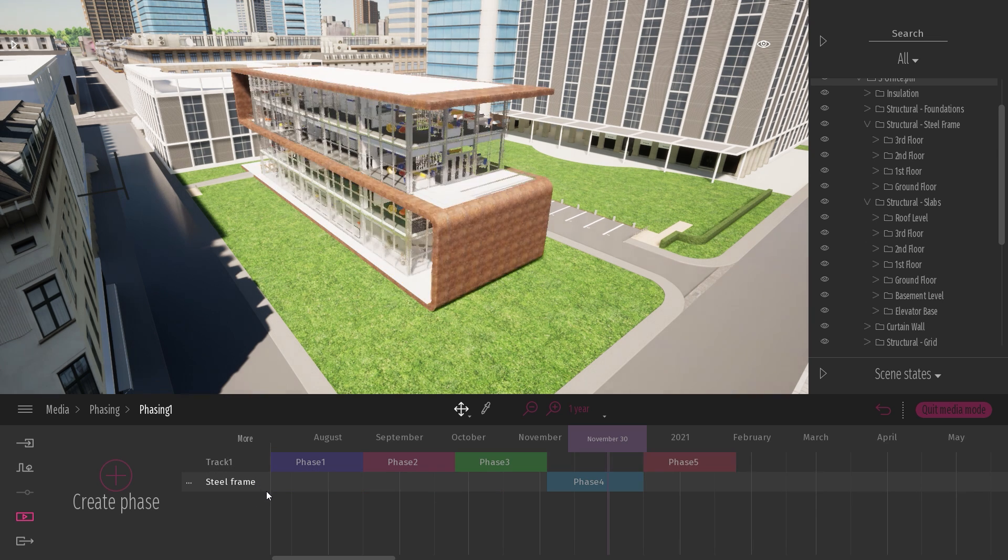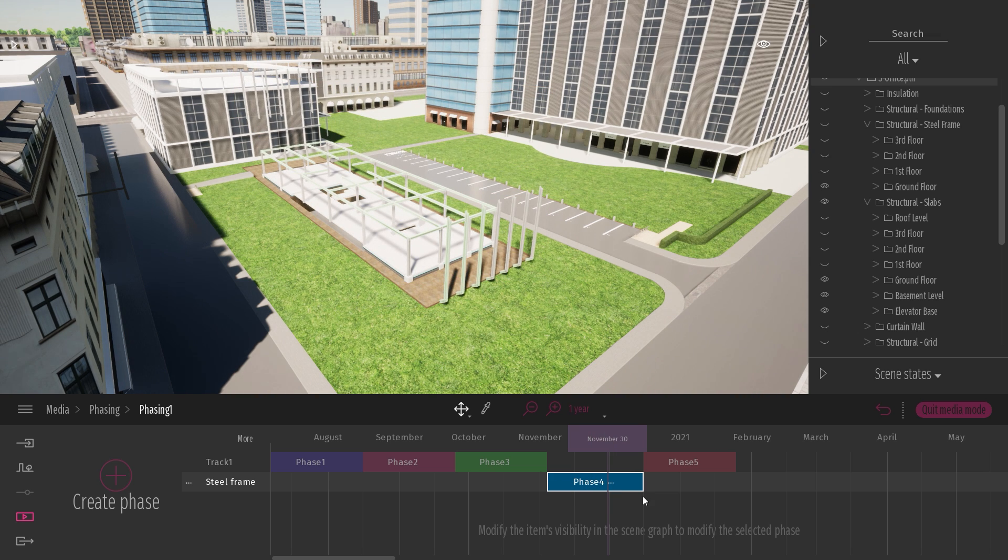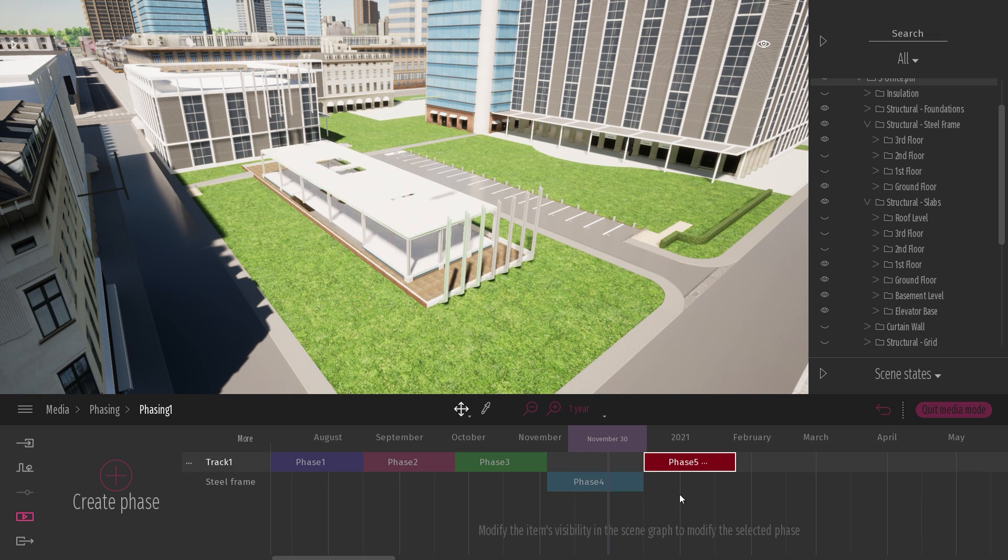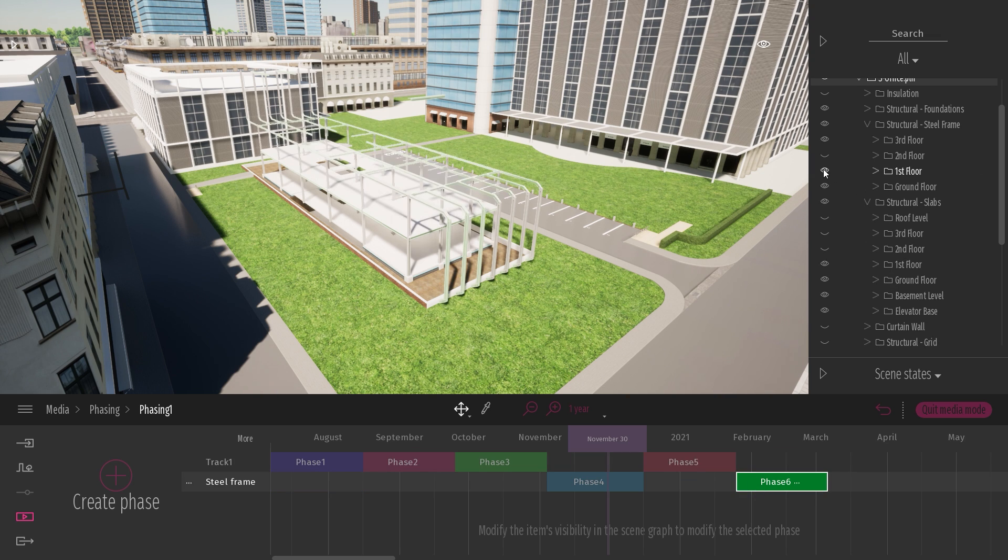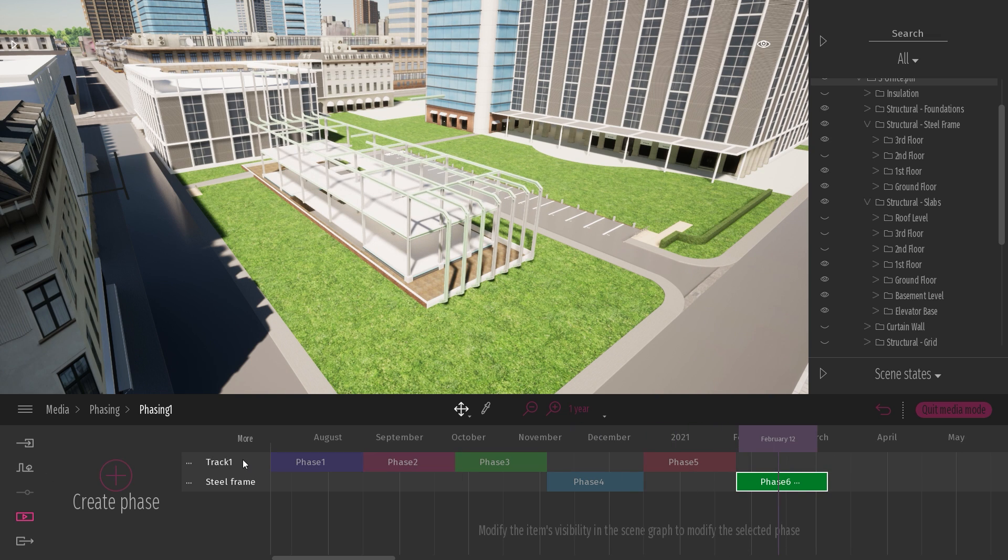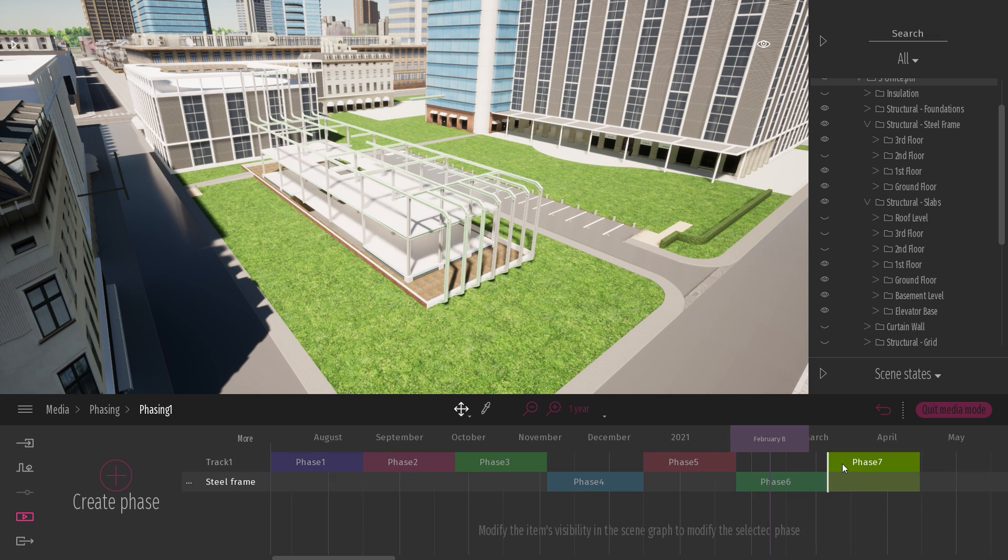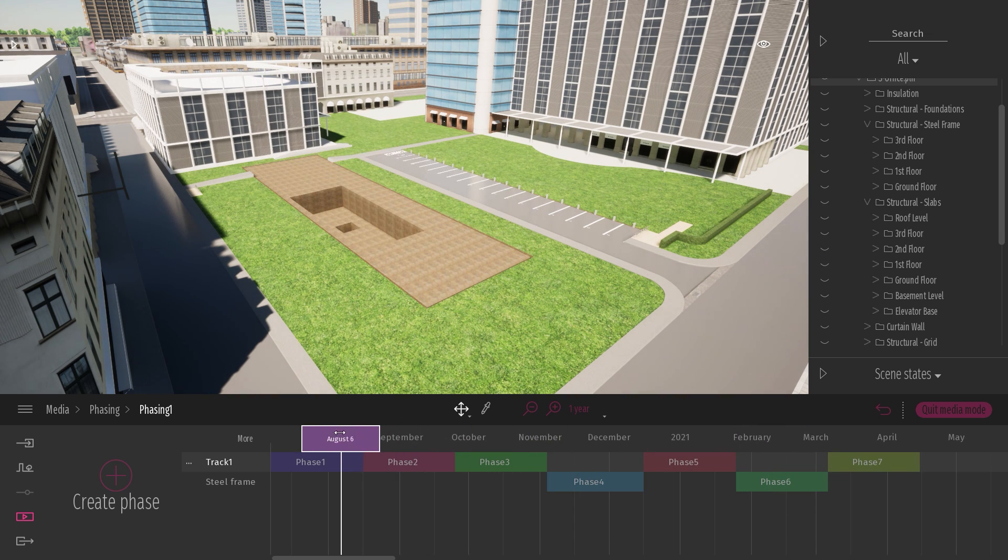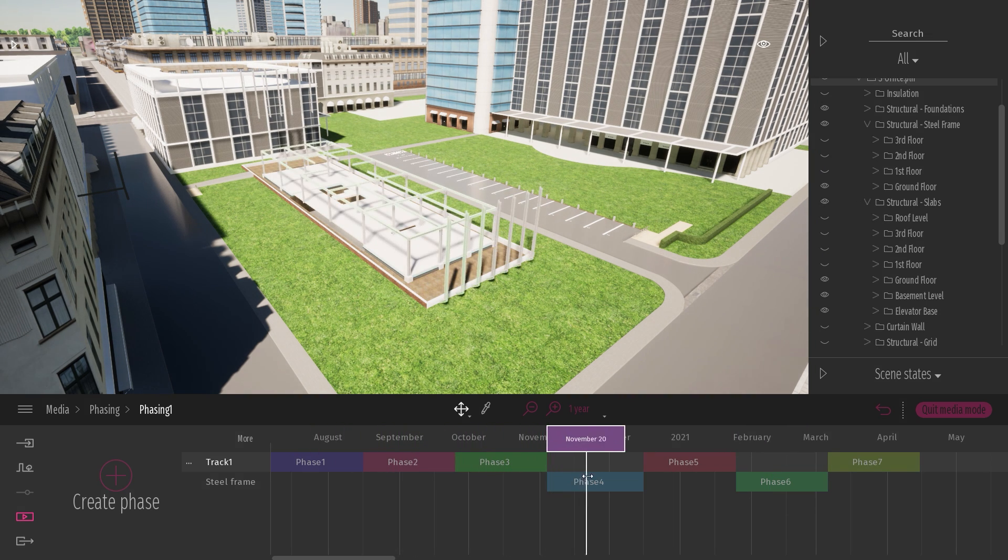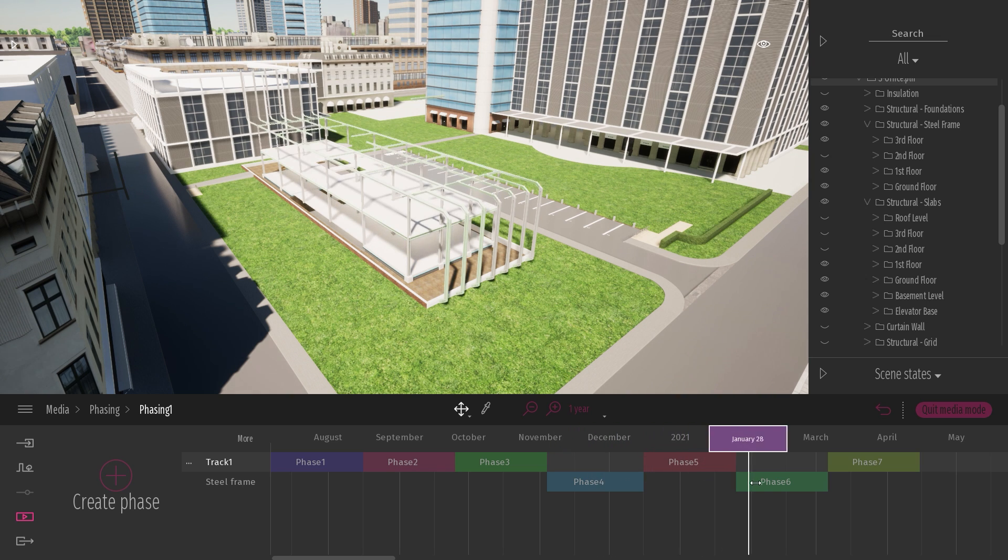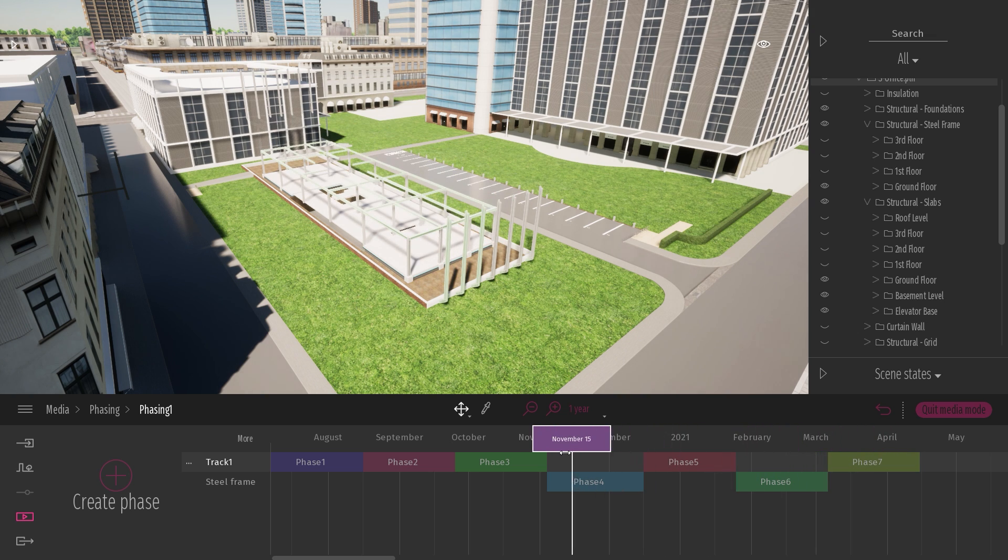Again, I will select my phase number five. Click on the plus button to create a new phase. On this one, I'm just going to visualize the second floor. Next thing is going here, click on the plus button to create a new phase. And again, unhide my slab. So here I've created a couple of frames that could present the construction steps of the start of my project.